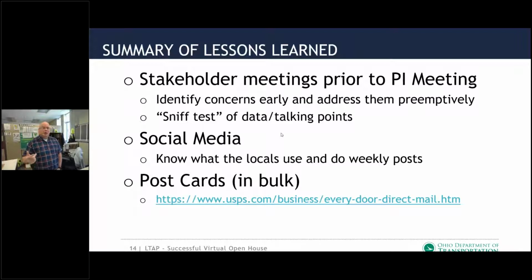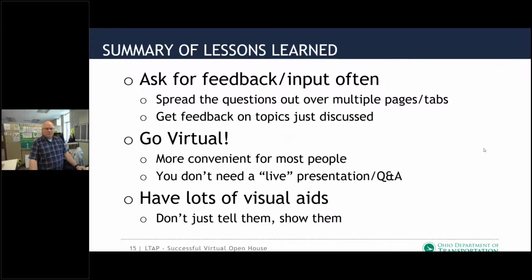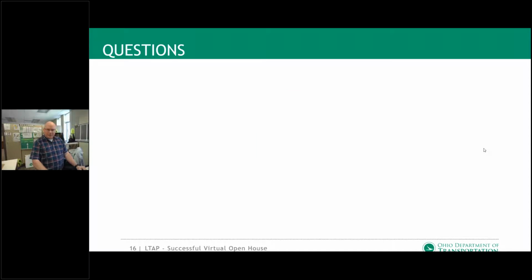The postcards, that QR code that we included with all the scanning, nobody from the newspaper scanned the QR code, but from the letters, we had multiple people scan that, and we also had multiple people scanning the flyers. So those two items that were not required were actually one of the bigger direct communications we had with the public. Social media was kind of indirect. Not too many people engaged directly from our posts, but they engaged with other people's retweeting or reposting of our information. Oh, I skipped a slide here.